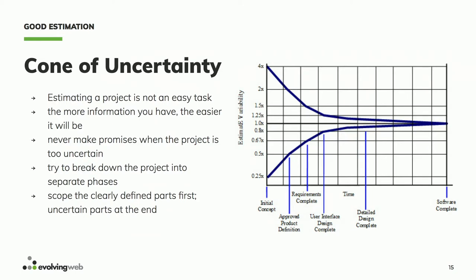And then you're getting warmer, and once you start actually writing the specs and doing the design, you think you know 75% of what this project is going to consist of. But then your developer starts working and starts building out your content types and reusing all the existing code that already exists. And it turns out that no, all that code that you assumed you'd reuse is not reusable at all, because that was Drupal 7 and this is Drupal 8, or this is multilingual.